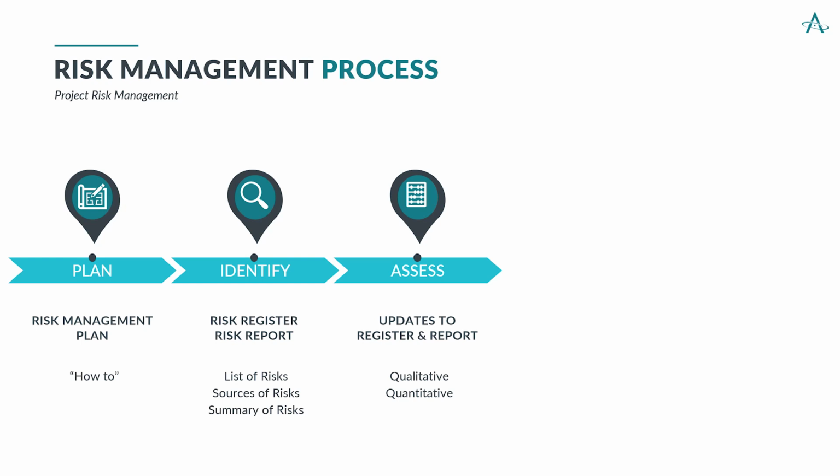We'll do qualitative or quantitative assessments. And for clarification, qualitative, here's that word quality as the root word there, allows you to prioritize by some measurement. For example, you would want to measure the probability that an event occurs and the expected impact.